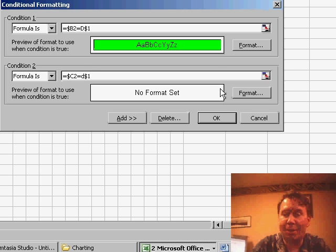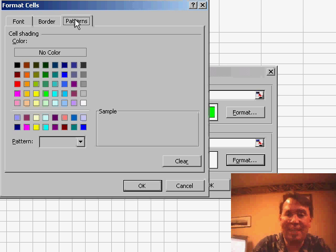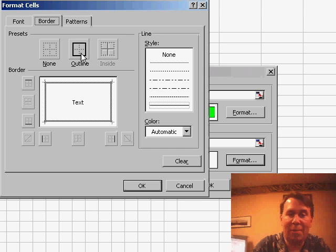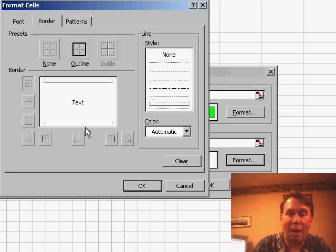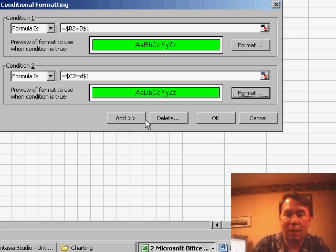If it is, I'll click the Format tab, choose the exact same color on the patterns, but this time on the Border tab, say that I want the border on the top, bottom, and right. Click OK.